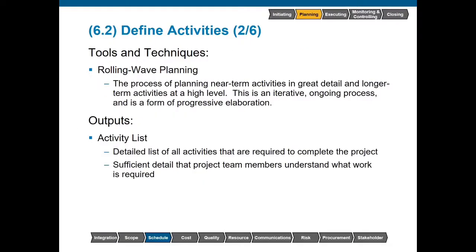Rolling wave planning is something that most of us do unconsciously for our entire lives. Basically, we're concentrating on near-term activities while still paying attention to the longer-term activities, but at a much higher level.